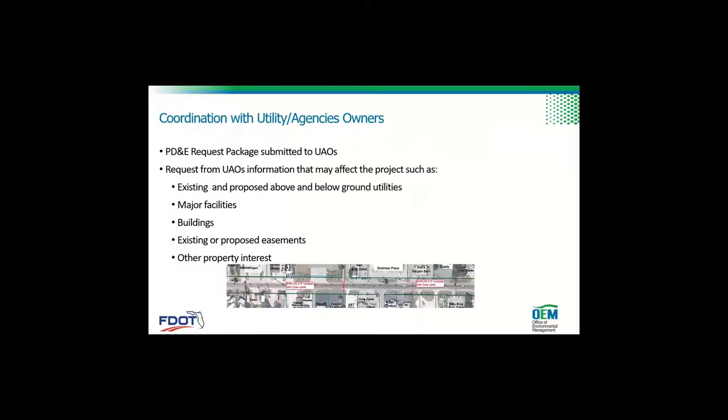Okay. So coordination with utility agency owners. Like I said, that's done through the PDE request package. So the requested information may affect the projects such as existing and proposed above and below ground utilities, major facilities, buildings, existing or proposed easements, and other property interests.